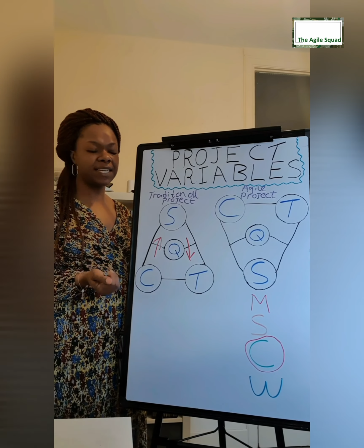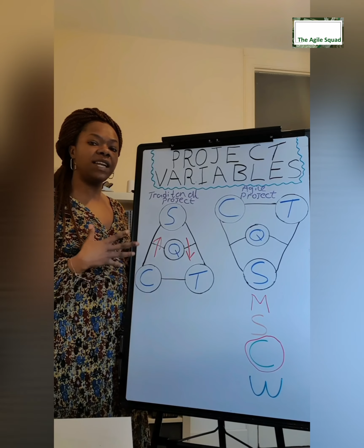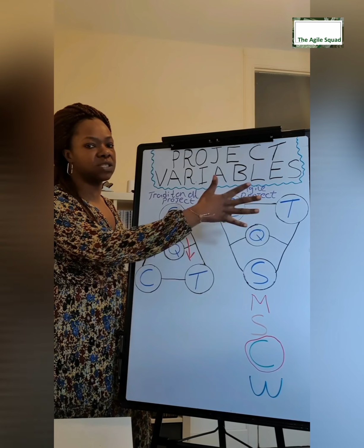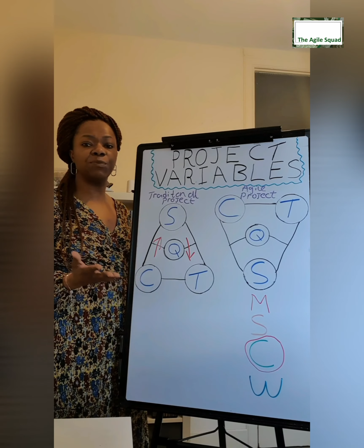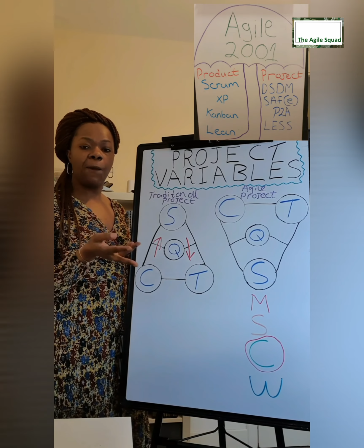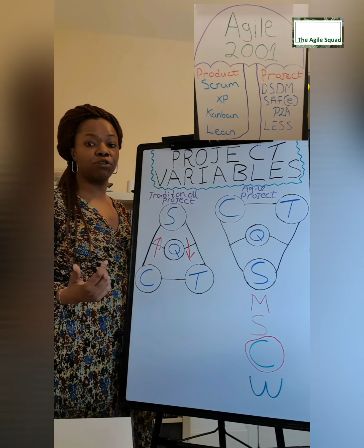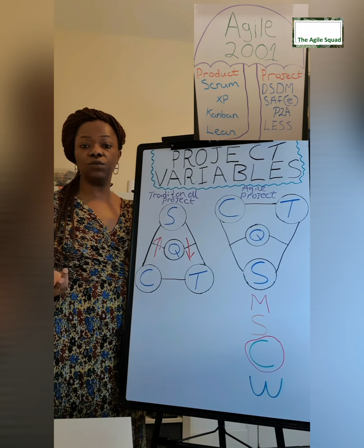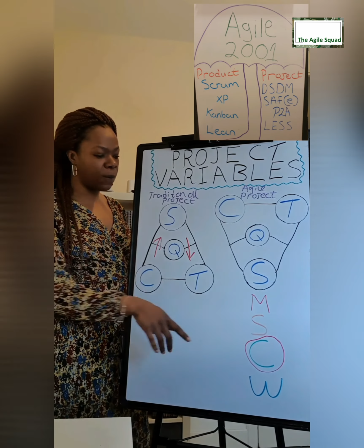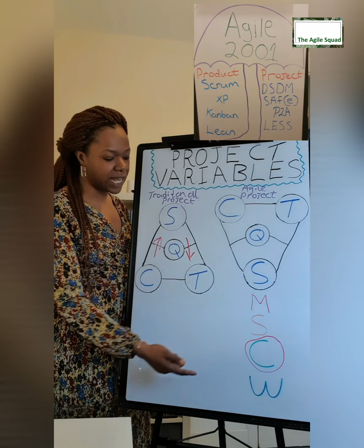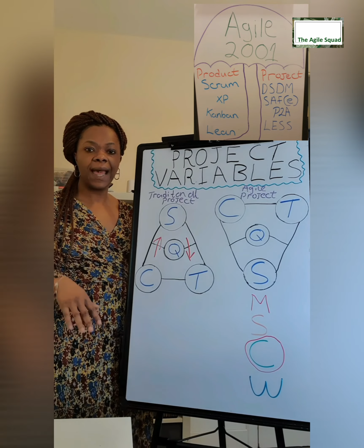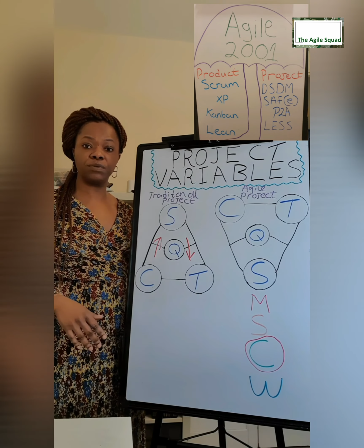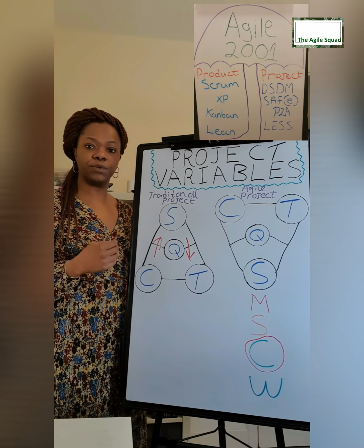And here we have it. This is our project variables. So now let's put this into practice. Let's say we are going to run an agile project and use this way of working. Let's bring back in our umbrella and we're going to use DSDM project management. We have, let's say, 200 things to do on our list so far, and we prioritize them. We have must have, should have, could have, won't have this time. As we start to build, we run into a problem and we de-scope. Next timebox, we de-scope.